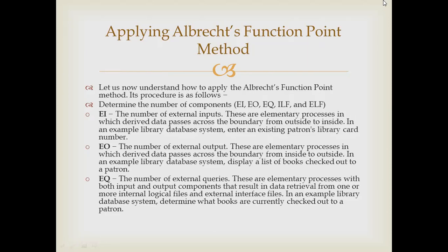Next is EQ, the number of external queries. These are elementary processes with both input and output components that result in data retrieval from one or more internal logical files and external interface files. For example, the library database system determines what books are currently checked out to the patron. The full list of books that the patron has checked out or issued will come up. This is nothing but both input and output: input because we are looking up data, output because it displays that data.